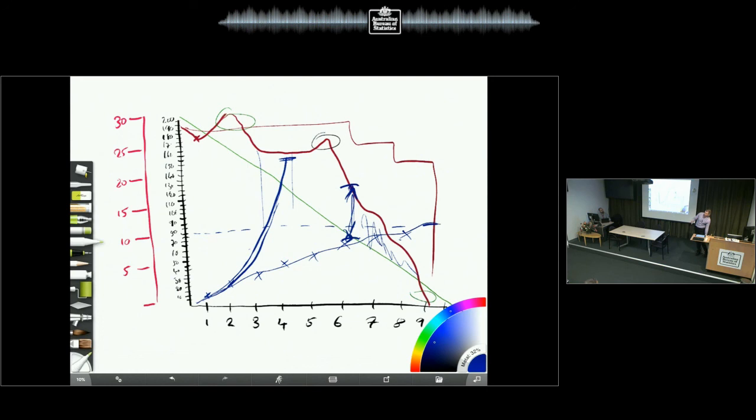What I do is we do the estimating of the stories, and we say these are 5, these are 8, and so on. At the end, we say, well, we think we can pull in 40 points on average. Then what I can also do is ask for the capacity of the team. So if there's 6 people, 6 people with 10 days times 8 is 480 hours, isn't it? I wouldn't expect this number to be 480. But what we would say is last sprint we had 6 people on the team, this sprint one guy's off for 3 days and somebody might be sick or whatever. So then what we do is just say roughly we're about 80%.